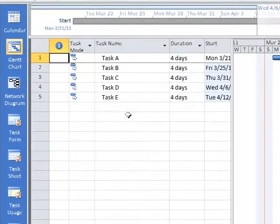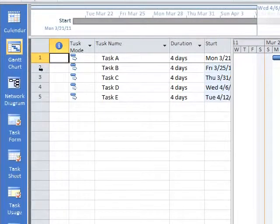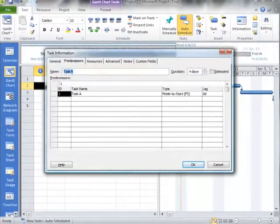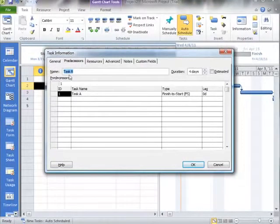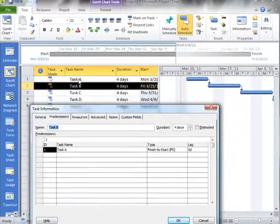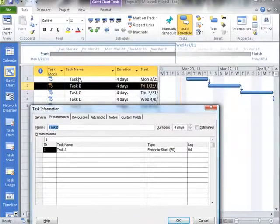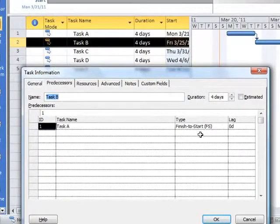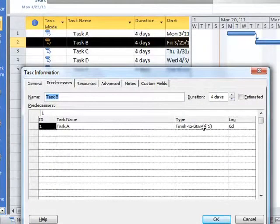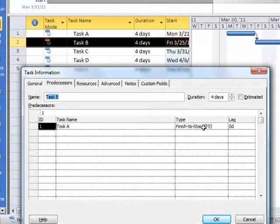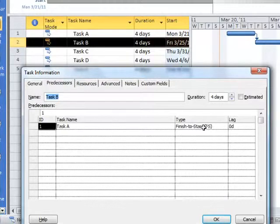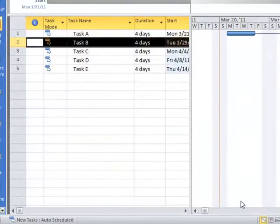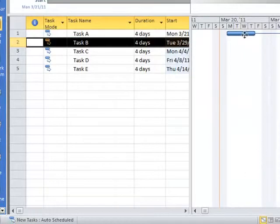We can also have these relationships. Task B is related to Task A by this Finish to Start relationship, which is shown here in the predecessor tab. Let's say that Task A was putting on the paint on our walls, and then we need to actually put down the carpet or put in the furniture. But we need some period of time to elapse between when we paint and when we actually start moving stuff in, in order for the paint to dry. Let's say that the paint needs to dry for two days. Notice what that does to our calendar. We now have this ending on the end of the day Thursday.